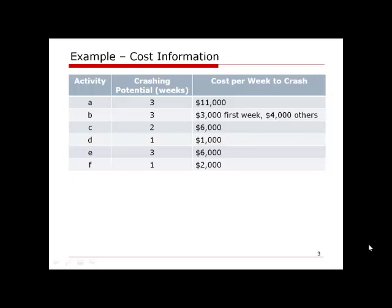The crashing potential information is listed in a table showing each activity, the maximum number of weeks we can crash it, and the corresponding cost per week to crash. Activity B has a special cost structure: $3,000 for the first week crashed, but $4,000 per week for any additional weeks beyond that.